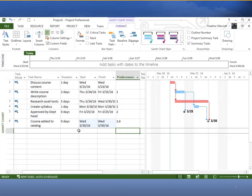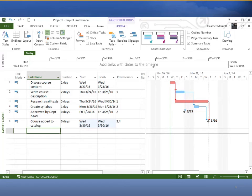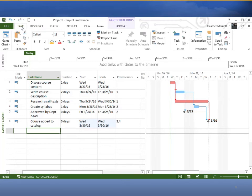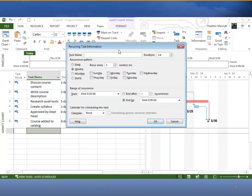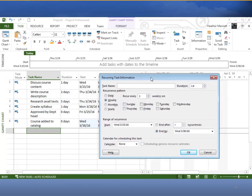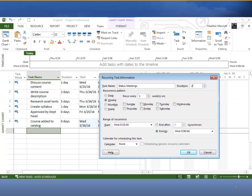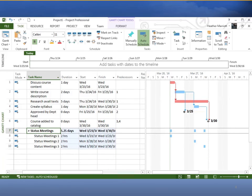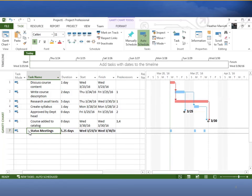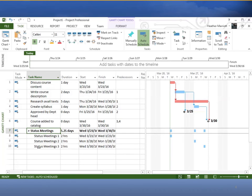One more thing we wanted to add was the bi-weekly status meeting. We can do that from the task tab. There's a pull down menu under tasks, and we're going to choose recurring tasks. Then we'll fill in this information: status meetings. It was going to be two hours every Monday and Wednesday for the whole length of our project, so from our project start date to our project end date. I can either collapse these into one line or let them take up a line for each of those status meetings.